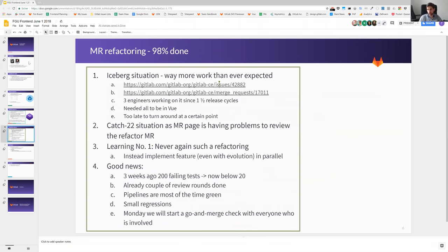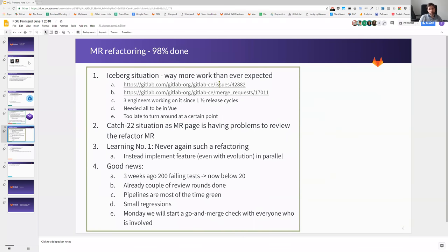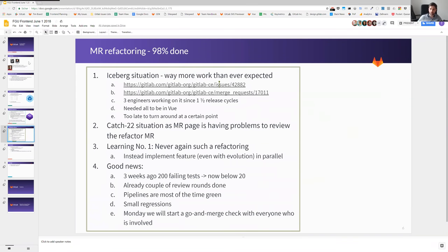One thing that we have hit is also a Catch-22 situation. We were rewriting the Merge Request page to make it much faster, but we were having to use the current one to review the code for that. My biggest learning and the biggest learning for the team is that we will never do again such a refactoring. The direction to do something like this in the future will definitely be to do a complete new implementation of that feature so that we re-implement the feature itself but have it either through a flag or as a side route so we can push to master, develop there, have small cycles there and go from there.